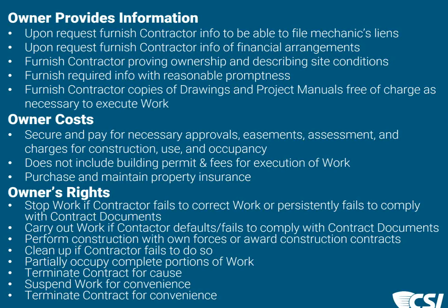For example, one of them is that site observations will occur as necessary for the project, but no less than once per week. And they modify that to be that they'll occur as often as necessary. So they've created their own standard. I don't know if I'm answering the question there or not.